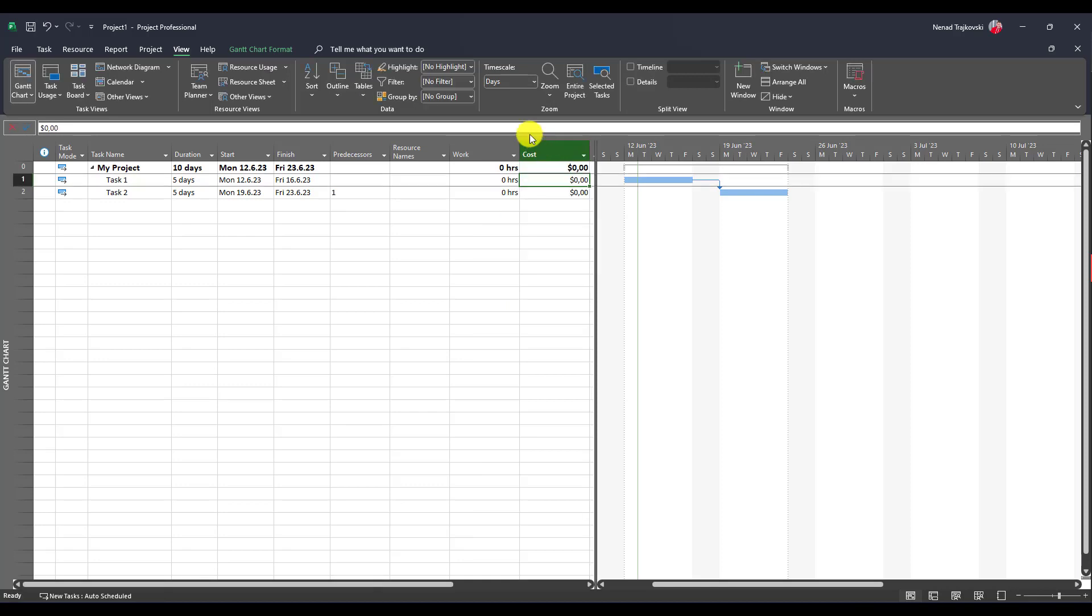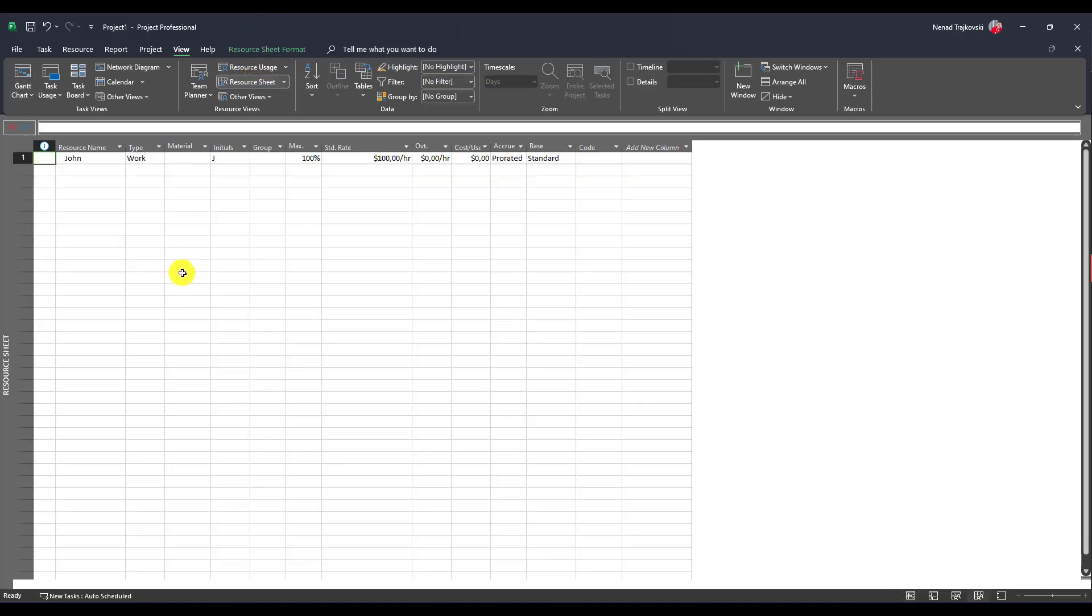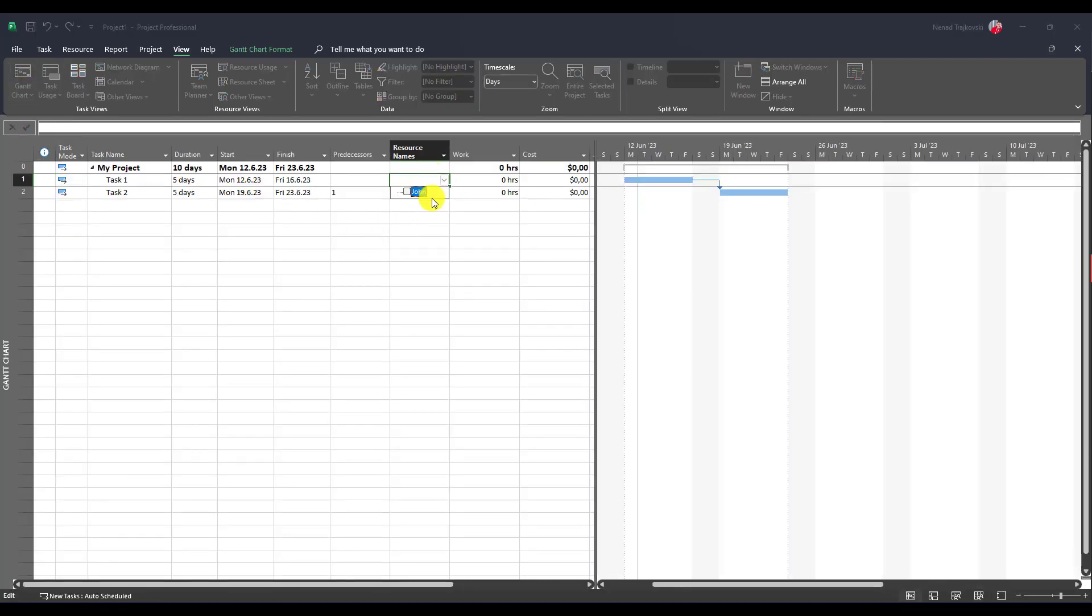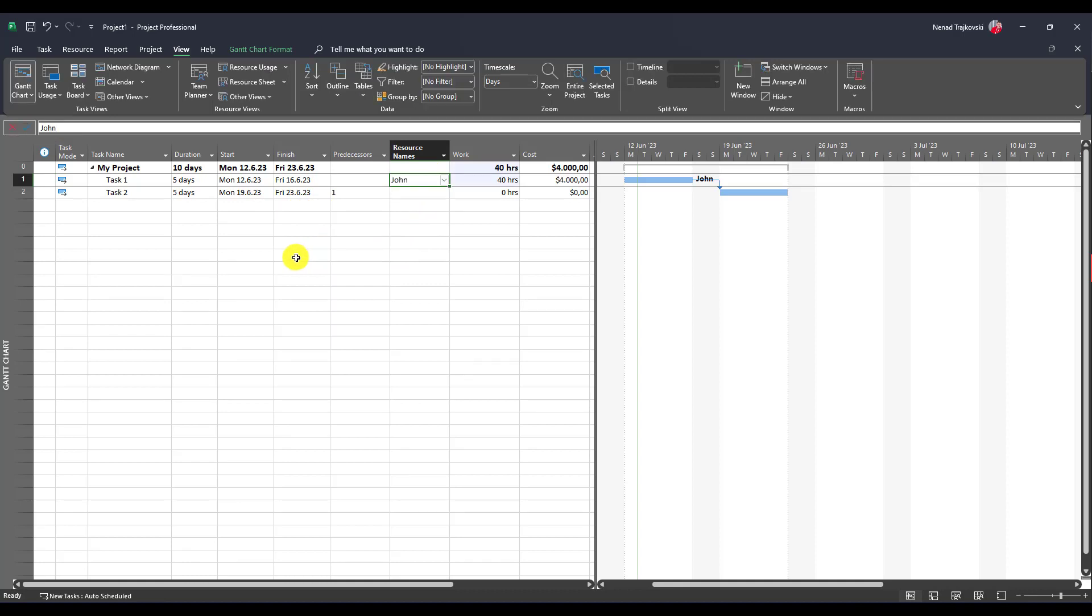Okay, now let's go to resource sheet and we will see that John has $100 per hour. If I assign him here, I will have $4,000 as a cost. Why? Five days multiplied by eight hours is 40 hours. 40 hours multiplied by $100 per hour leads us to $4,000.